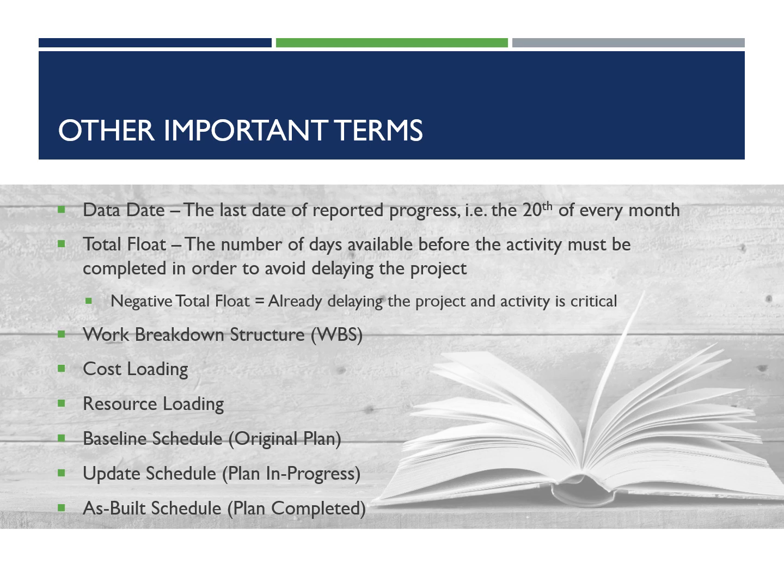All those percent completes, actual starts, actual finishes, and the cost loading end up getting put into the schedule of values, and that schedule of values is what we use for pay requests to determine how much to pay for the month, or whatever the billing cycle is.